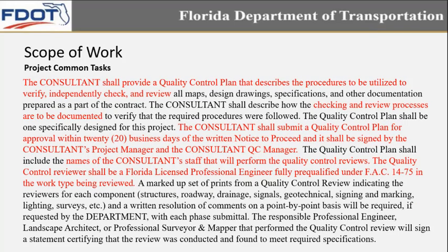And again, going back to the scope of work. In our project scope of work, under common tasks, that section on quality control, there's a lot listed there. These are some of the key highlights that I found. There's obviously more there. The consultant shall provide a quality control plan that describes the procedures to be utilized to verify, independently check, and review all maps, designs, drawings, specifications. The consultant shall describe how the checking and review process are to be documented,